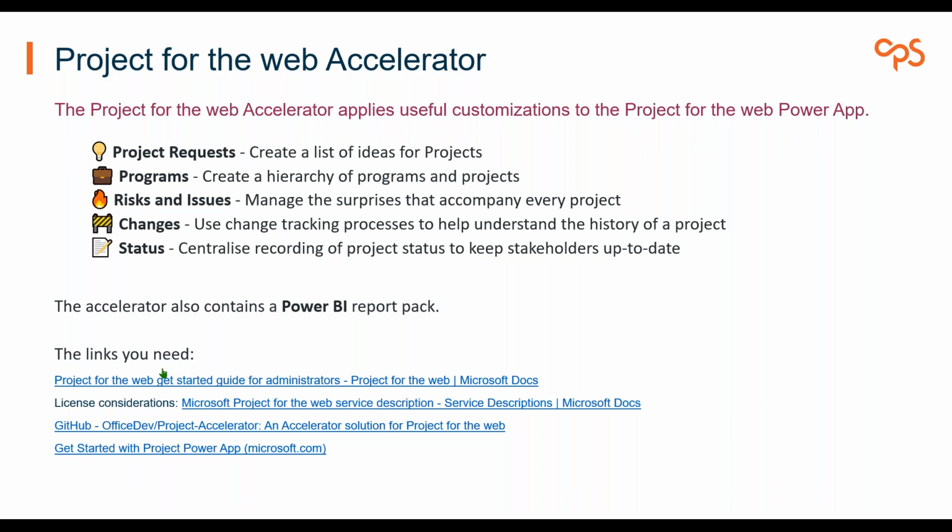If you have one last question, Carol Ives asks, can you export and import MS Project plans? You can import a Microsoft Project plan, yes. There are a couple of caveats at the moment. Project for the Web has a limit currently of 500 tasks in a project schedule, although again, that is planned to change. And you can export it back to Excel.